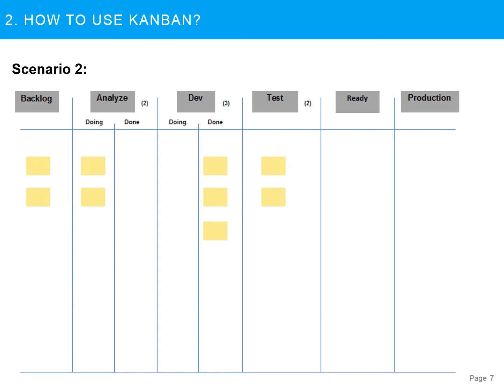Here is another scenario, and this is of a bottleneck. Can you guess where's the bottleneck? Yes, it's the testers. All the developers out there, they go like, yeah. Well, either it's taking the testers long to test due to the complexity of the task, or maybe the developers have written buggy code. But whatever it is, it is causing a bottleneck in the process. So what can we do here?